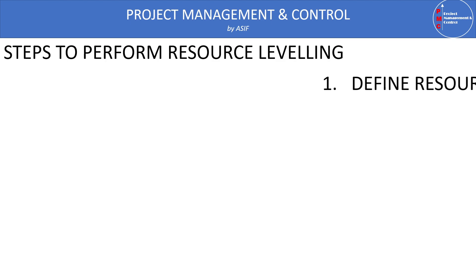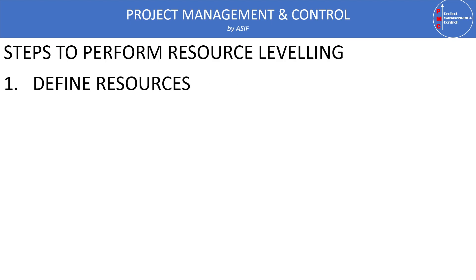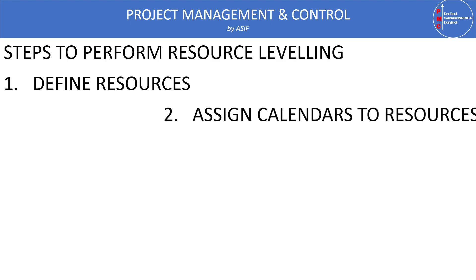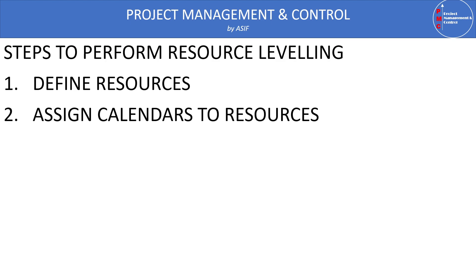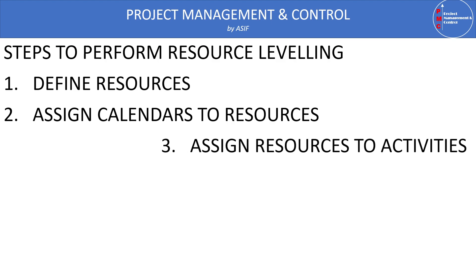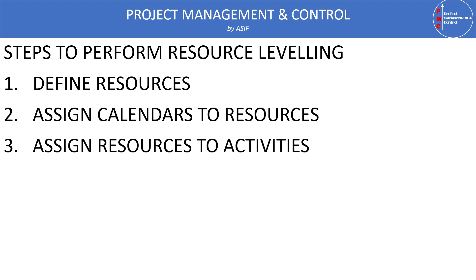To perform resource leveling, follow these steps: Step one — define resources. List and create all required resources in Primavera P6. Assign an appropriate calendar to each resource, defining their availability dates. This calendar timing should match the project time schedule, so that resource start and finish dates fall within the activity dates.